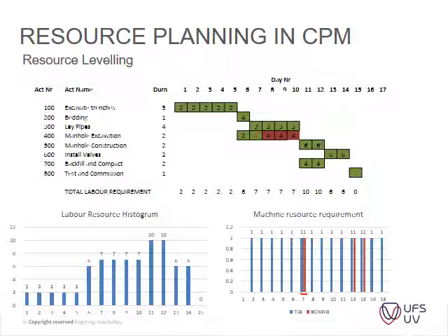the manual excavations, we now need 4 laborers for 4 days instead of this 1 day where we had the 1 TLB at our disposal. So what basically happened was we took away the 1 TLB on this 1 day, and we added 4 laborers per day to this item, for 4 days, so our labor increased to 7 on these days. So that's what changed.